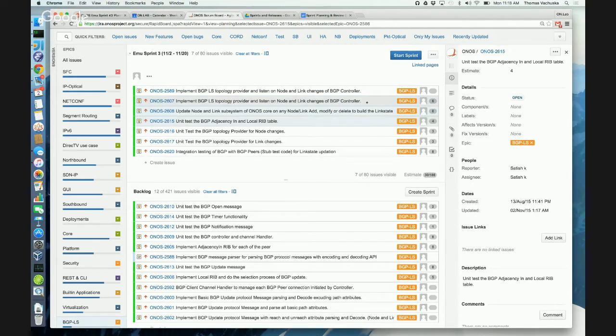Okay. So a couple of observations. I don't know if you heard me right. These three points right here, these three stories, are sized using weird numbers. Those are not Fibonacci numbers. Second of all, even if you leave things as they are, it's 30 points, pretty much work done by only one person. I presume Satish is the only one working on it. Is that correct?